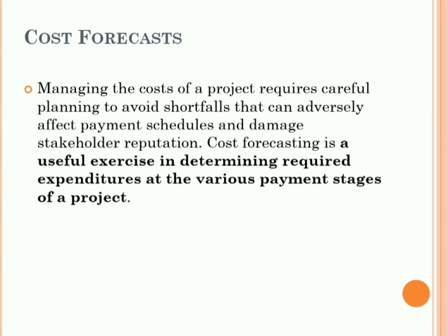That is how we can confirm the basics of the forecast. The scope here is what scope will be included in the cost forecast, that is approved and unapproved changes. And execution here is what execution plan and changes will be included in the cost forecast, that is offshoring versus reshoring, make versus buy decisions, project acceleration versus pacing. All these things come under confirming forecast basics, which is a step in the forecasting of a project.